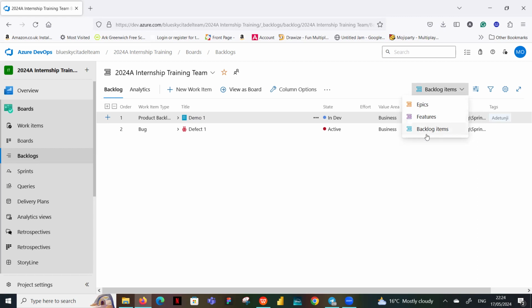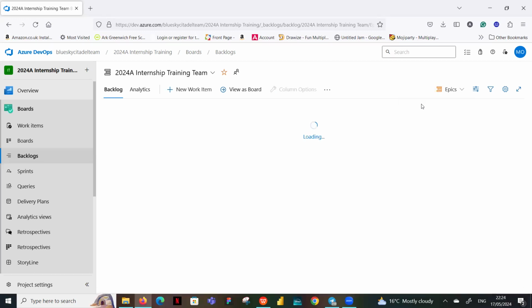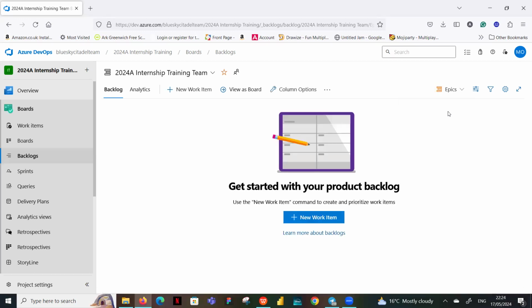The stories is where you have the requirements. What is the expected end of that particular requirement? And then you have the tasks under it, which is the specific things you need to do under that story to achieve those requirements. So those are your work items, the navigation for your backlog items. And we have them there. So normally the BAs would, okay, so this is the BA thing, and I think their mentors would train and teach you here. So don't let me go into what you need to do. Mine is just to show you where you need to go to start what you need to create.